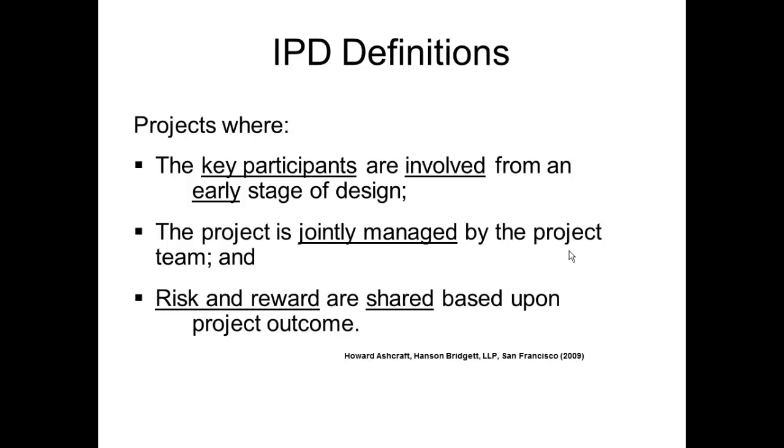In these projects, the key participants are involved from an early stage of the design, and the project is jointly managed by the project team, which could include the contractor. Basically we do this anyway, but the risk and the reward are shared based upon project outcome. That's a tough one to handle, especially where I'm working for a university and we're dealing with nonprofits. We just want to get the project done.